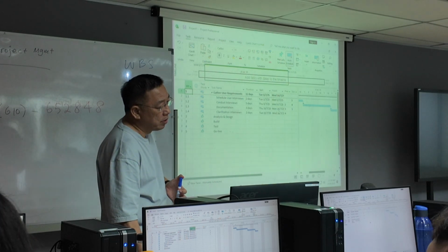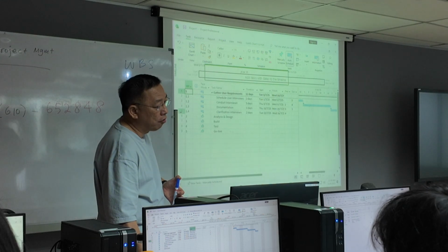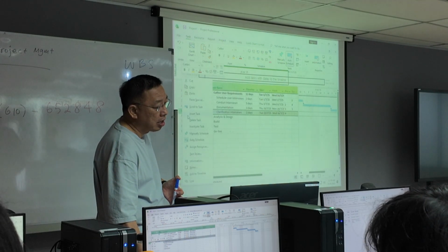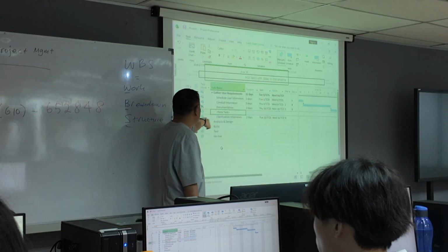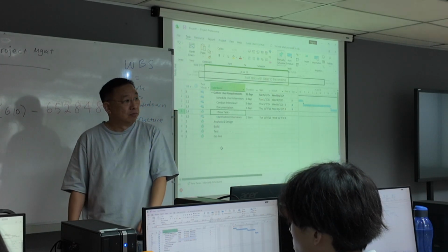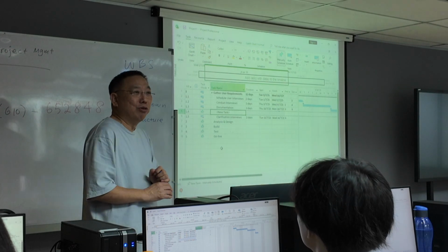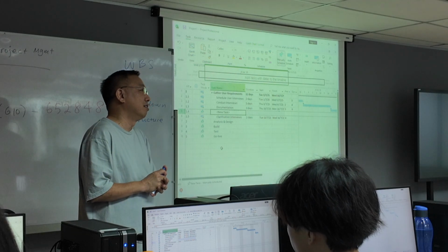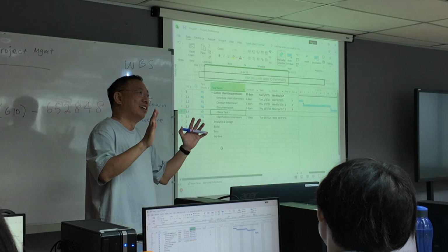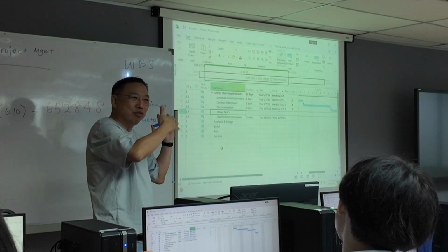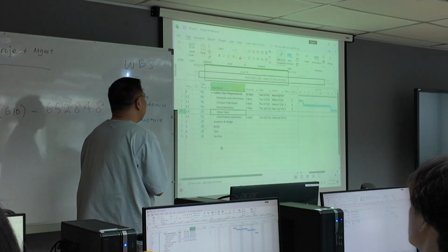And you notice once you put in WBS, if let's say you have another new task between 1.3 and 1.4, and you insert a new task, automatically what was previously 1.4 clarification interviews now becomes 1.5. Okay. And I think that's all you need to know at this point in time about Microsoft Project. It's very easy to use, a lot like Excel, but it's not Excel. It's more of a database system because it keeps track of a lot of things and a lot of relationships between items, right? More like a database.